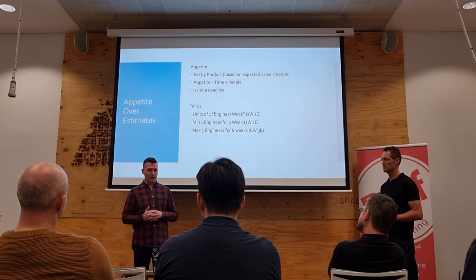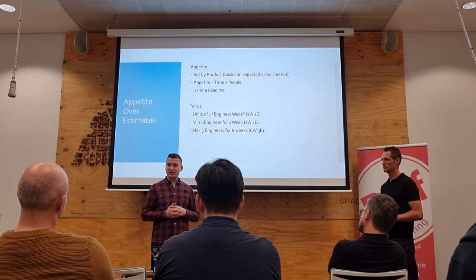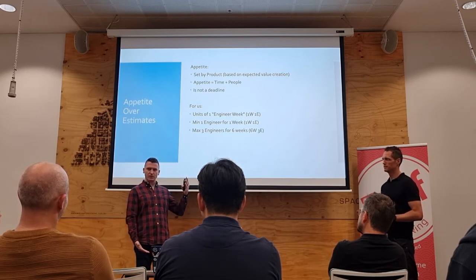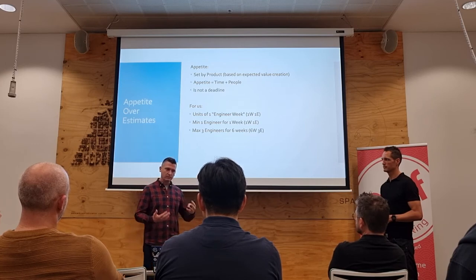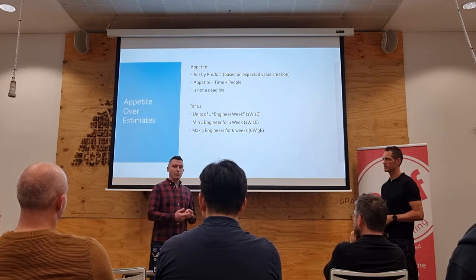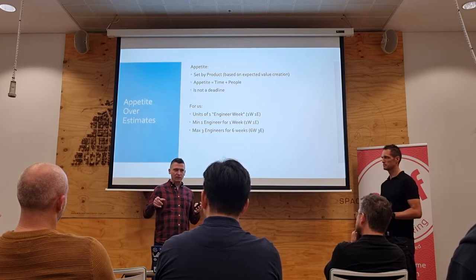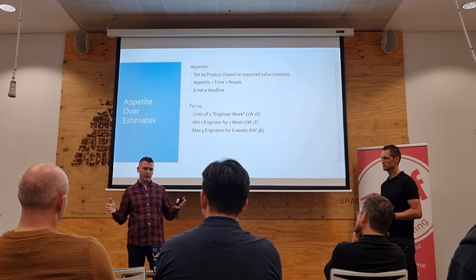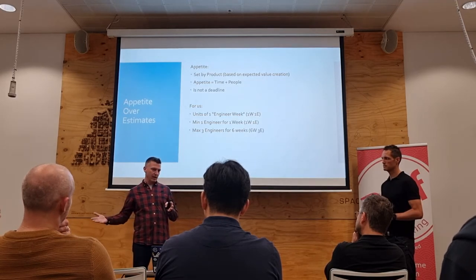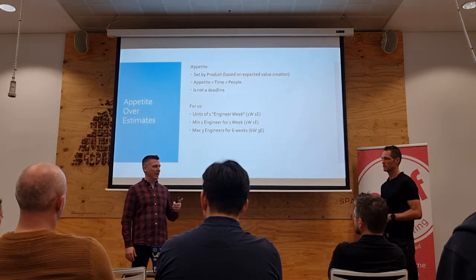It was marketing related. And we said, so we're dedicating 6 weeks to solving this problem. Let's talk about how we're going to get towards those outcomes. And the first thing is, well, should we tell you our list of requirements first, and then you tell us how long that will take? And we said, well, that's how we tried to do it before, but I think we can agree it hasn't worked to date. Continue. And what if we tell you that within week two, we can probably give you the first outcome here, and within week four or five, we'll give you a second outcome. At the end of the 6 weeks, we might not have the magical pony, but you will have something that moves towards that outcome. That was a really important moment. It's like, oh, now we know how to talk to our stakeholders about how we're working.